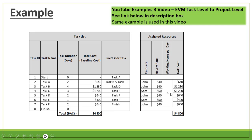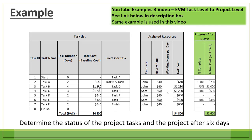For task B: 40 × 8 = 320 × 4 = $1,280. Microsoft Project will calculate the costs the same way, giving a budget at completion of $4,800. After 6 days, the percentage complete is: task A 100%, task B 75%, task C 50%, and task E 50%. The actual costs up to the status date are: task A $750, task B $1,000, task C $500, and task E $350, with a total actual cost of $2,600.